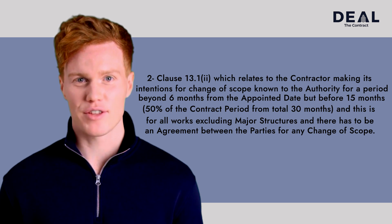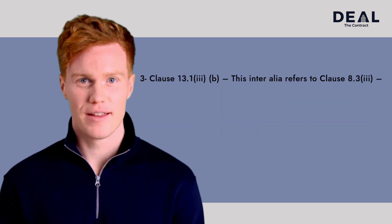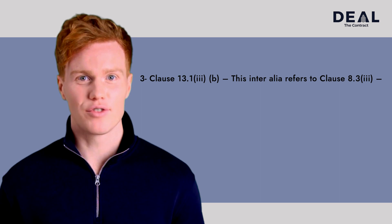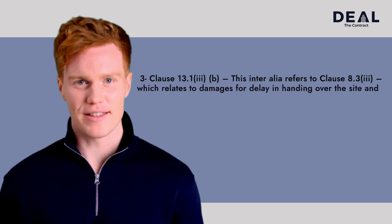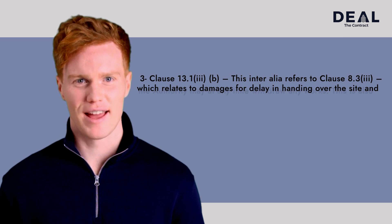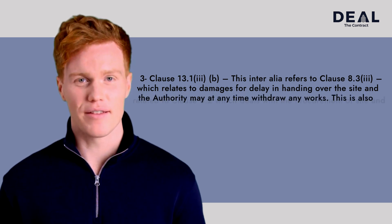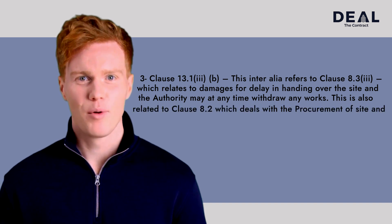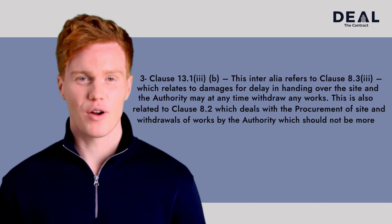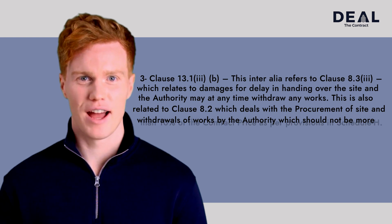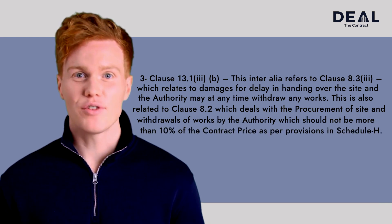Third, Clause 13.1.3(b) inter alia refers to Clause 8.3.3, which relates to damages for delay in handing over the site, and states that the authority may at any time withdraw any works. This is also related to Clause 8.2, which deals with the procurement of site and withdrawal of works by the authority, which should not be more than 10% of the contract price as per the provisions in Schedule H.